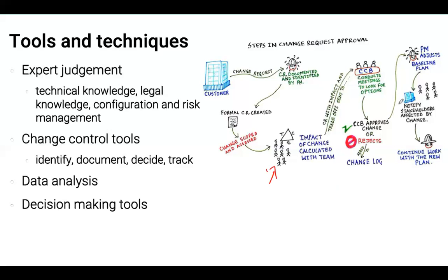People who are required to know, the stakeholders, and more clearly, people who have been identified as needing to be notified about the change based on the change area and change requirements, need to be notified about that change. And then the change is implemented into the project plan. The project plan can be carried out, and it's not the original plan, it is a new plan which implements the change, and that change should be present within the new scope baseline.